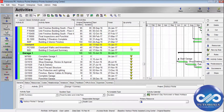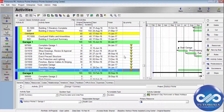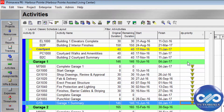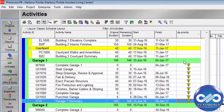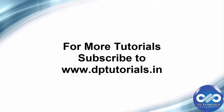You can group, sort, and filter based on indicators just like other UDF types. Indicator UDF data is functionally the same as other UDFs, but displayed as color-coded icons. When running reports, the icons are not visible — they display as text like green, yellow, red, or blue. This is how we work with user-defined fields in Primavera. In the next tutorial we will cover calendars and how to create them. Please subscribe for more upcoming videos. Thank you.